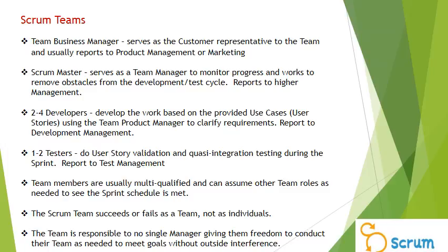You have 2 to 4 developers who develop the work based upon provided use cases. These are called user stories in Scrum terminology, using the team product manager to clarify requirements. You then have 1 to 2 testers who do user story validation and quasi-integration testing during the sprint.